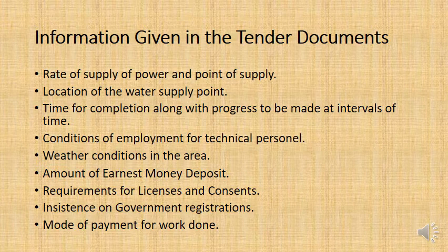The mode of payment, will you be paid a lump sum? Will it be cost plus percentage? Will the payment be paid once the work is completely finished? Or will it be paid in installments? Will you be paid 50% once the foundations are made and 50% when the rest of the work is done, for example?